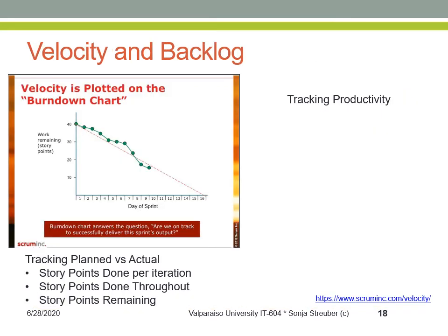So now we need to talk about the uncomfortable part of Agile management, the frequent, obvious tracking of team productivity at the end of each sprint in the sprint review meeting. But it can get as granular as productivity tracking at the beginning of each day, at the end of the Scrum meeting. In any of these cases, the product owner will want to know how the planned productivity for each sprint relates to the actual productivity, that is, the planned or forecasted velocity versus the actual velocity. Or in other words, she will want to know how many story points were done in each iteration or also each day. And remember that done means fully completed and tested user stories.